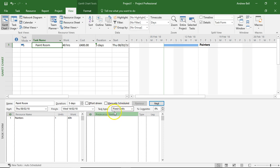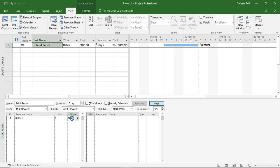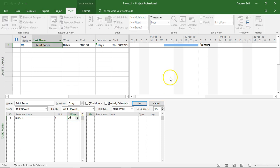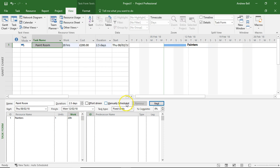And once you understand that the default is fixed units, that's absolutely fine. Because what we need to do now is say that there's 20 hours of work and I'm going to click OK and let the computer give me the incorrect duration.